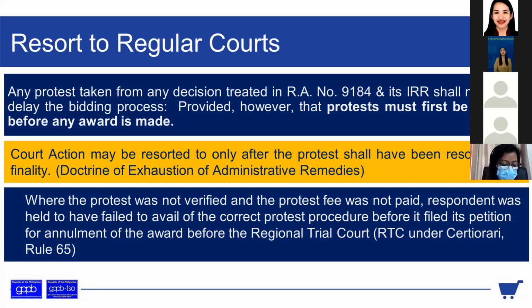Tuloy-tuloy pa rin po yun. Hindi po siya magsistay or mati-TRO. Huwag po kayong maniniwala pag sasabi, pati-TRO ko yan. Why? Because as I've said earlier, it involves a government project. And government projects do not delay. Sabi nga ng 10-wheeler truck na dumaan sa bahay ko. So yun, IRR and RA 9184, mga mechanisms on protest shall not stay the bidding process.